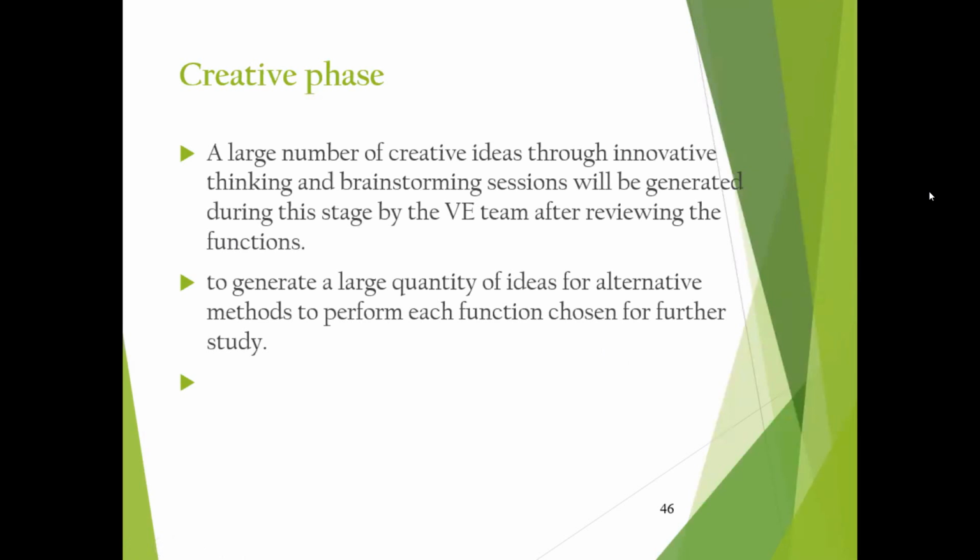Okay, so after the functional analysis, what is the outcome? What functions we're going to keep, improve, and what functions we're going to eliminate. And for those improving functional performance, list them out. And for those functions, we come up with technical solutions. That is creative ideas through innovative thinking and brainstorming.